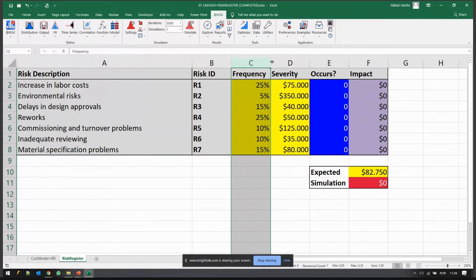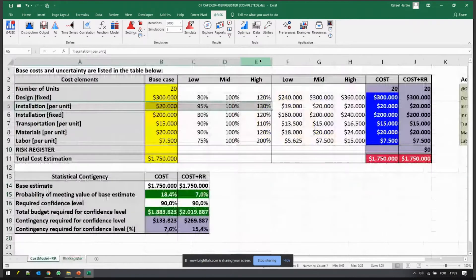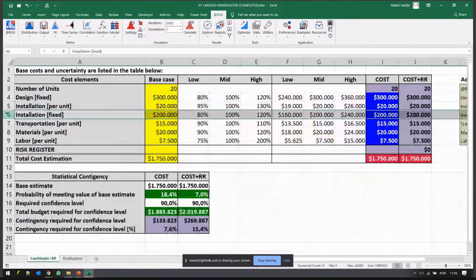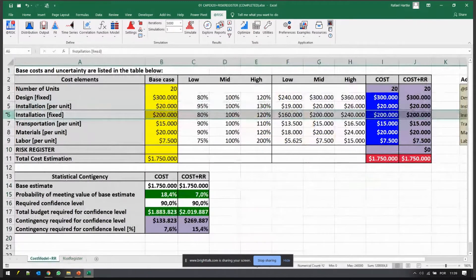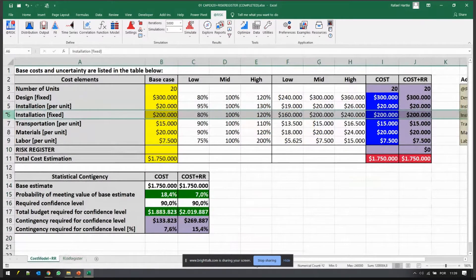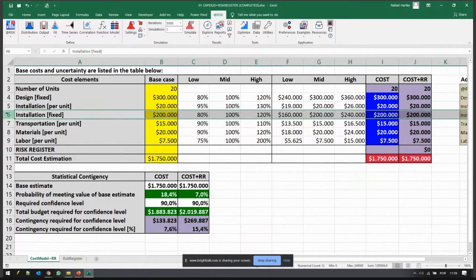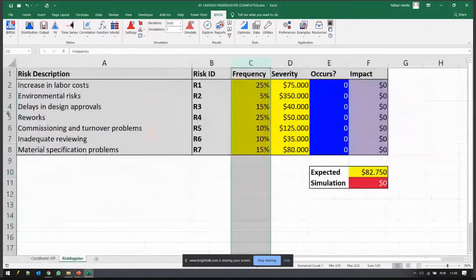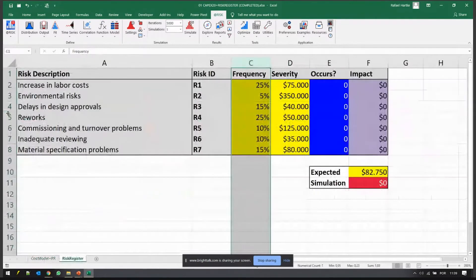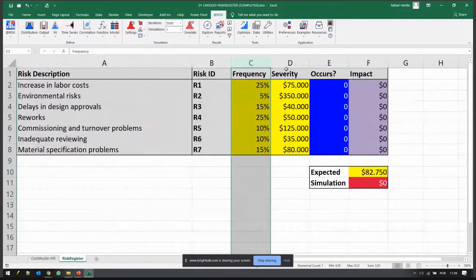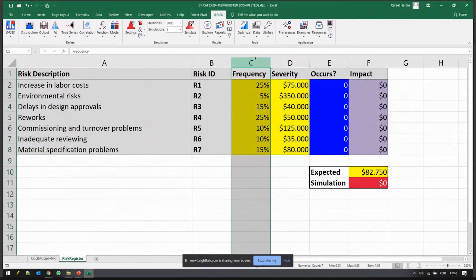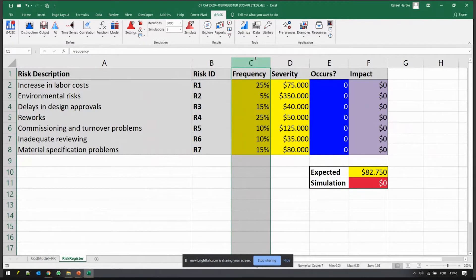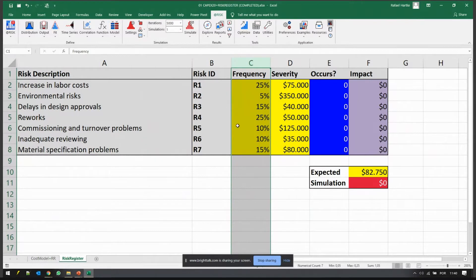If something has 90% chance of occurring, that's probably one line of my project because I will have to deal with that. There might be a 10% chance of saving money, of a negative cost here for example, but most of the things we have in the risk register are small probability, high impact events.